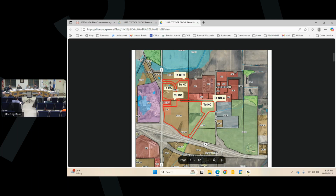Because we did have an issue on the other plats, where 3 lots that contributed to the water, but they're not responsible for the maintenance of it. And we dumped on the same ones as what we did at Dewey's, because it wasn't done at the beginning. So Troy, the proposal here, after 5 years, and we can work development agreement language to buttress this, but the proposal is that the stormwater lots would be